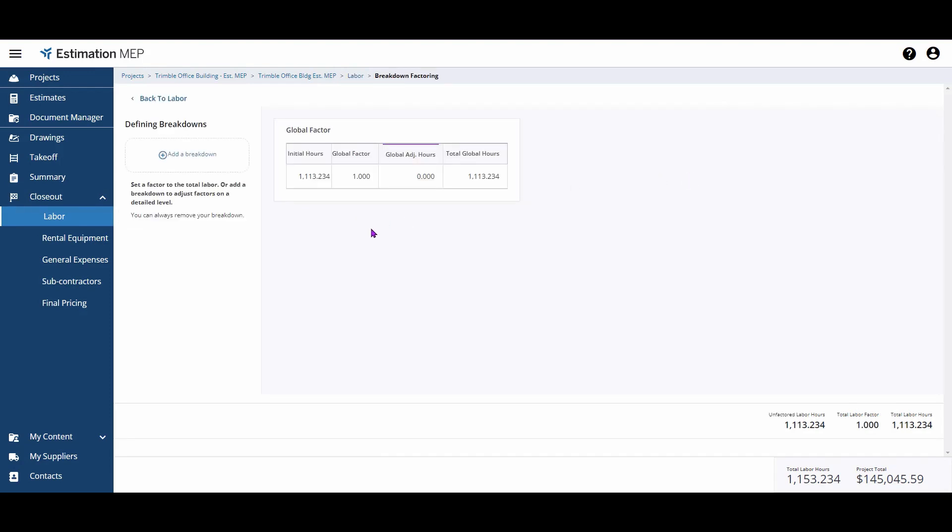Your first option is the Global Factor. This option allows you to apply a factor across the board to all labor on your job. For example, here we're applying a 25% increase to our direct labor on this job. As a reminder, your direct labor is the result of any items or assemblies you've included in your audit trail on this estimate.